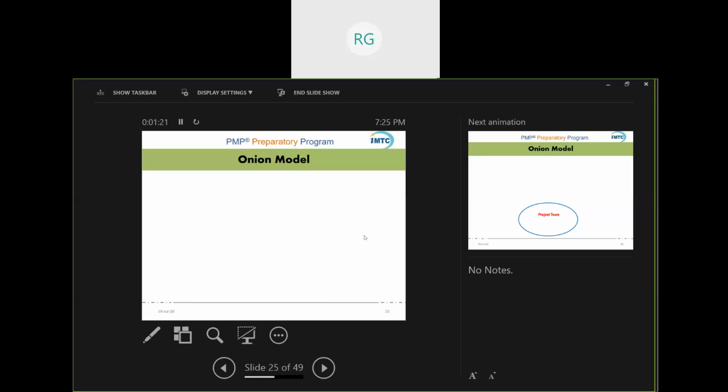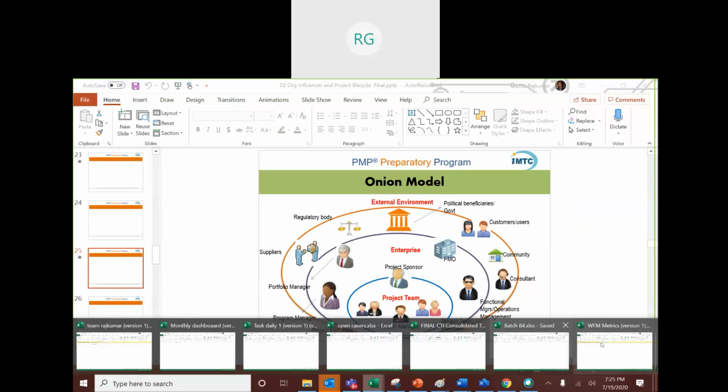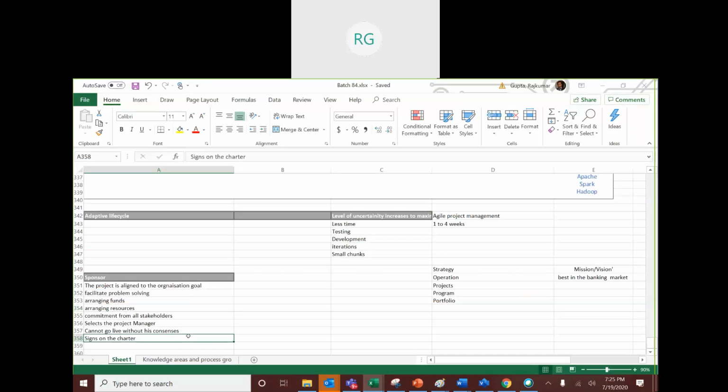Now somebody needs to be driving this from the organization. I would say, okay, maybe the information security head is the right guy because he understands security more, and probably that becomes the top guy. Now, does he do it himself? No, he does not do it himself. He will find a project manager who can do it for him, but he becomes the ultimate responsible for the project.